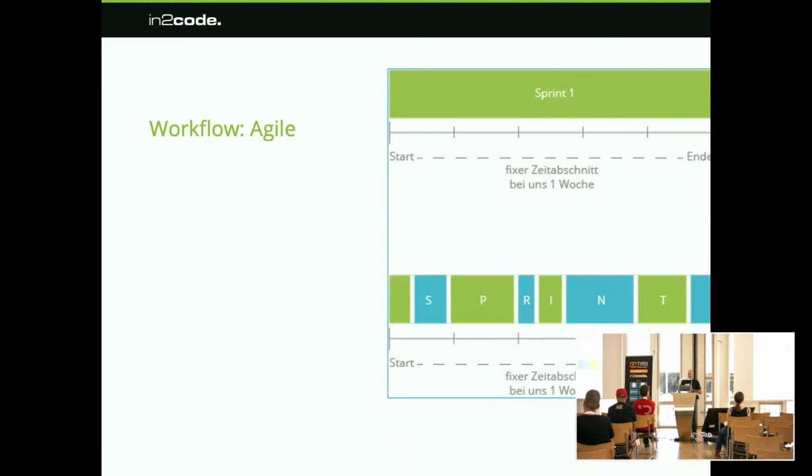Yeah, what about workflow and agile? One of the issues we had was that we only had a gut feeling about where we could deliver a project. Then we started to introduce different types of planning. We planned a lot with different tools. In the end, we came out with a very simple solution that's calendar-based, and we try to limit the sprints a team can have to maybe 1 or 2 in parallel.